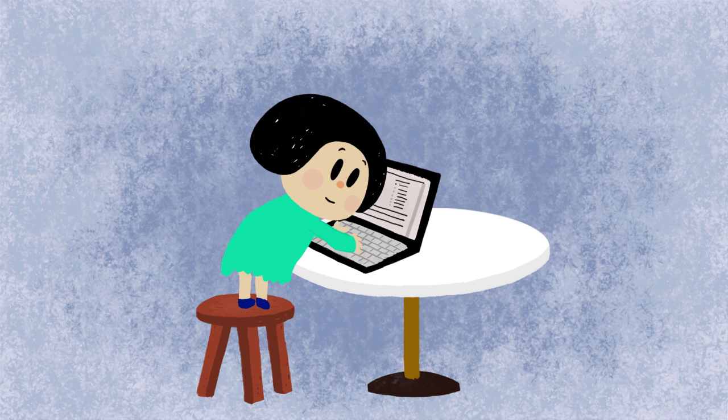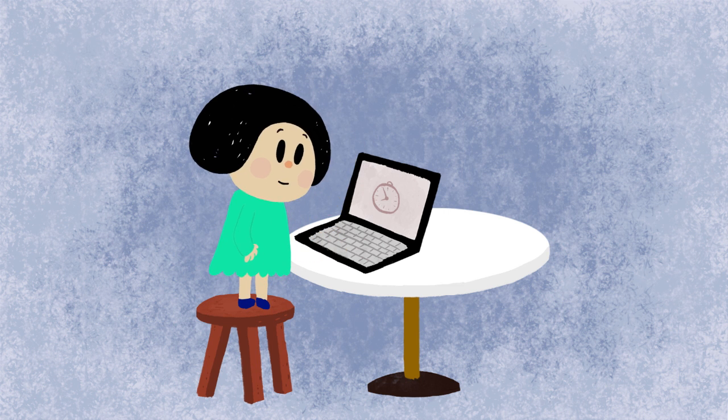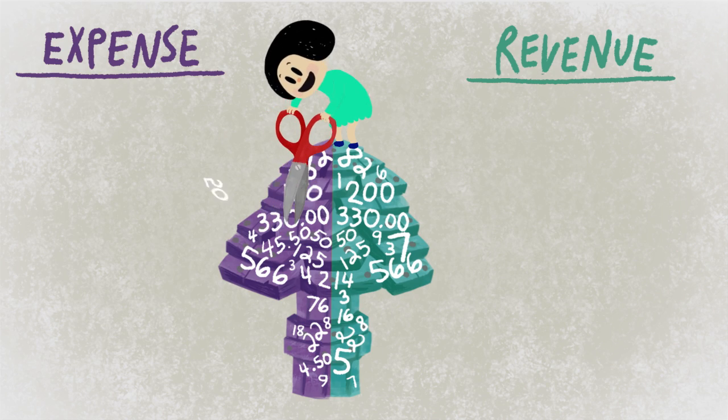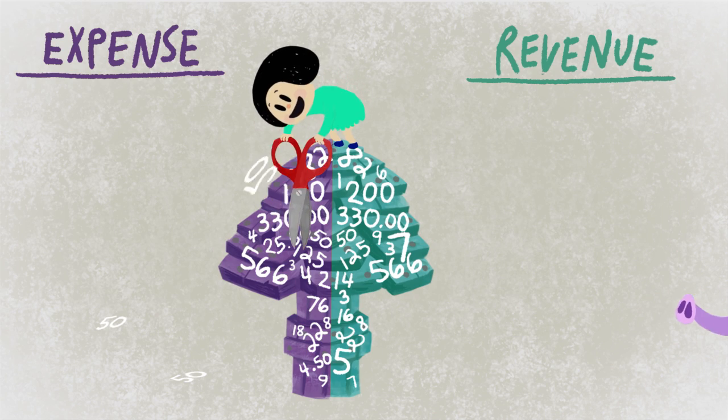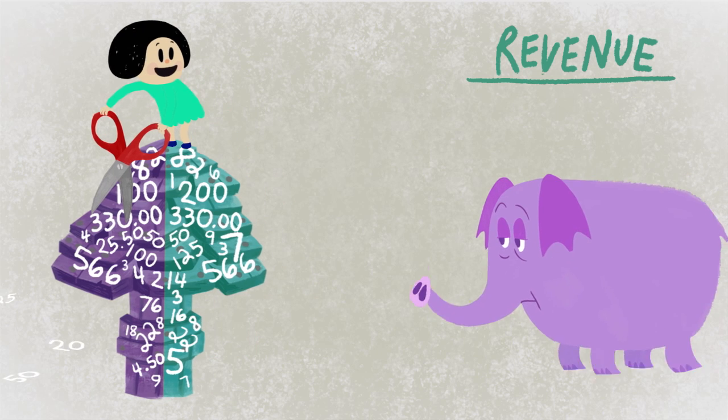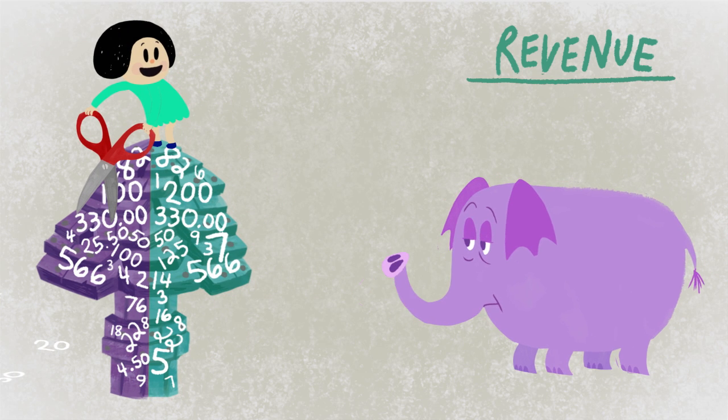Once you have filled in all of your project expenses and revenue, the online form will calculate the difference. This will be your RACC grant request amount. If the difference is more than $6,000, you will need to go back into your budget and trim expenses, or consider additional ways to raise more cash or in-kind donations.